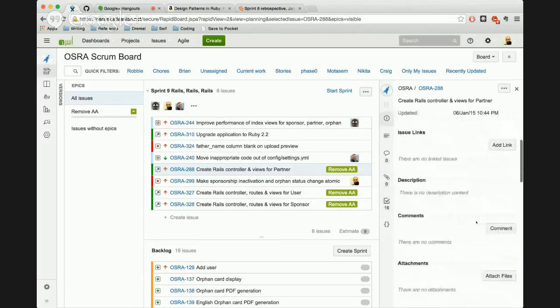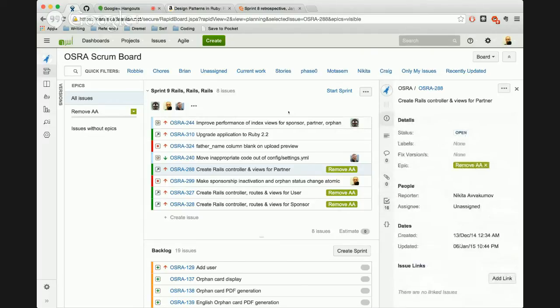Okay. Is there anything else? Andre, you'll be disappointed again because there's not a single story point here. I thought that Jira counts only points, but apparently it also counts issues that were resolved. So it still patted us on the back, saying that 7 issues were resolved. Yeah, sure. I mean, our burn down chart is going to be non-existent basically for this sprint. Okay. So again, your earlier concern that our velocity might be a bit difficult to judge is valid.